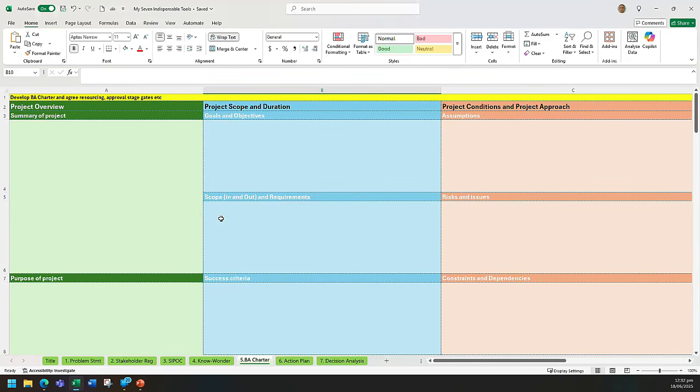I pulled together a big list of requirements, about 80 that we had to think about. We then broke them down into work streams, or themed them, and did one of these for each of the themes, and there ended up being about eight. It just made it feel a little bit more manageable.